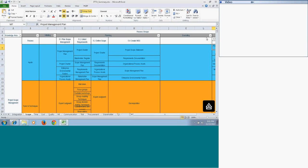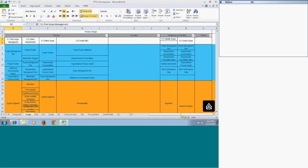Today we will speak about the Scope Management knowledge area, which is the second knowledge area as per the PMBOK. In scope management we have a total of six processes. There is no process in the initiating process group, but starting from planning we have: Plan Scope Management, Collect Requirements, Define Scope, and Create Work Breakdown Structure. In monitoring and control we have Validate Scope and Control Scope.